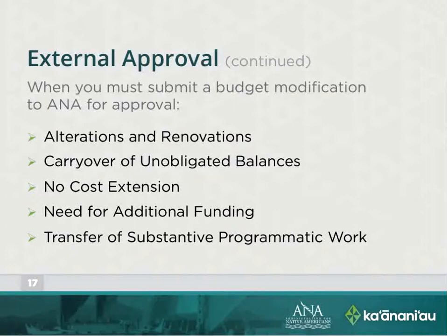Now we know we asked for a final budget period report 90 days from the end of the budget period. And a lot of times grantees will submit the second semi-annual report and mark it final because they pretty much know their expenditures have been paid and everything is complete, and they'll submit it at that time. But the general rule is to submit your carryover request as soon as possible in the budget period.